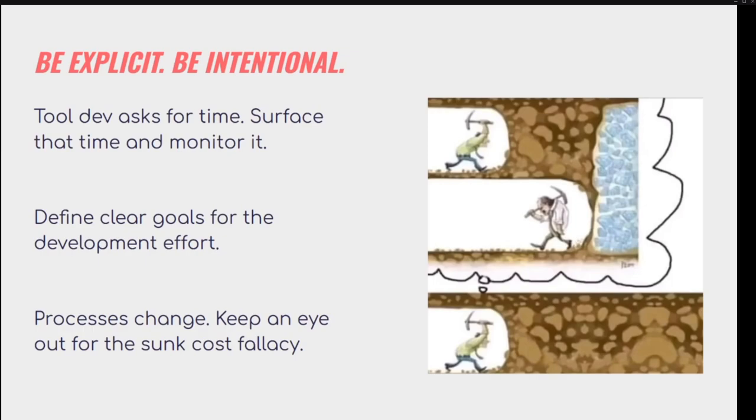And it also helps you understand, as things move and processes change, when an idea might be worth abandoning, right? The phrase in game development that always keeps cropping up is kill your darlings. Tools dev is not immune to that line of thinking. At some point, if you keep investing into a tool, you are contributing to the sunk cost fallacy, where you're saying, no, I need to continue working on this because we've already invested so much time into it. Sometimes it might be worth cutting early and developing a new tool, or looking at how the process needs to change.